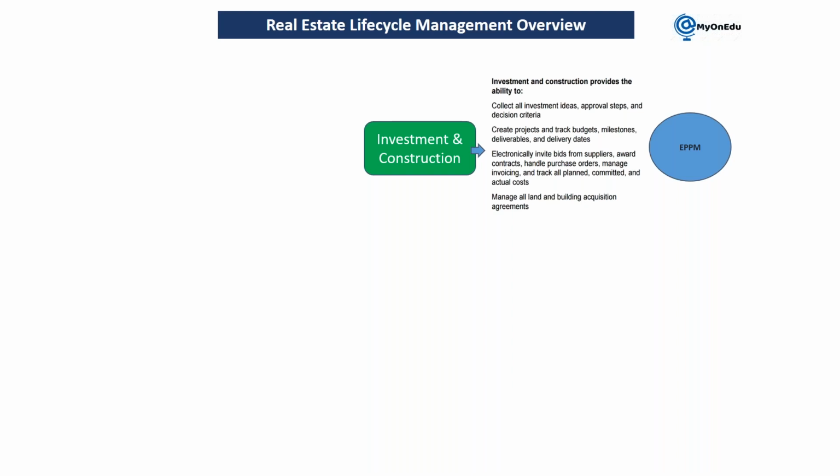Okay, through appropriation request, there is one specific business process which can be used there. Once your appropriation request is approved, you can transfer this idea initiative to your project system, where all detailed planning and construction execution will be taken care of. And once your product is ready, once your building is ready, then you will move to ReFx, flexible real estate management. So here in investment and construction, it is providing us all investment ideas, approval steps and decision